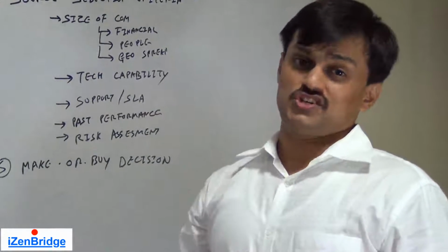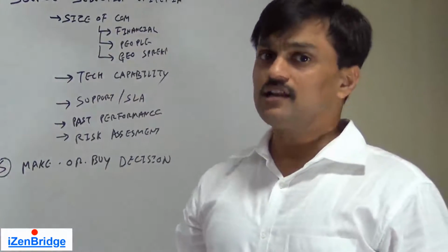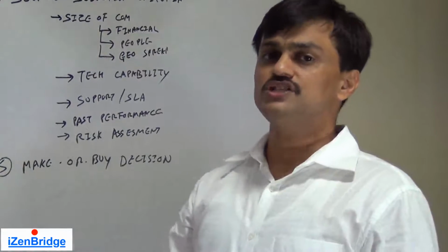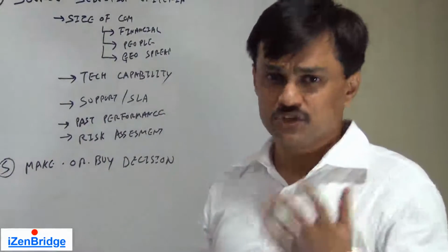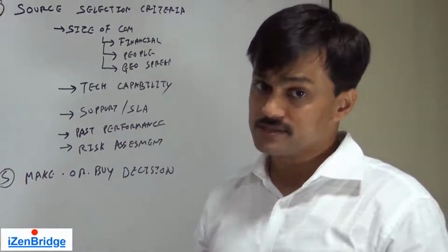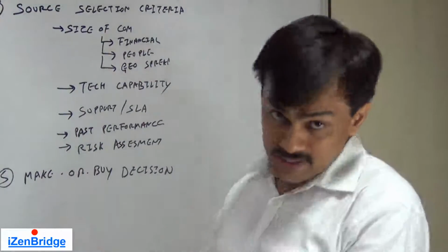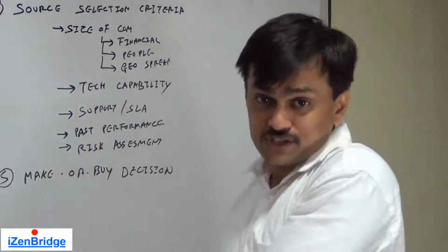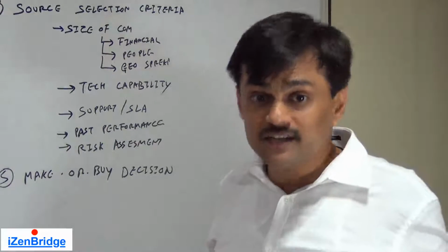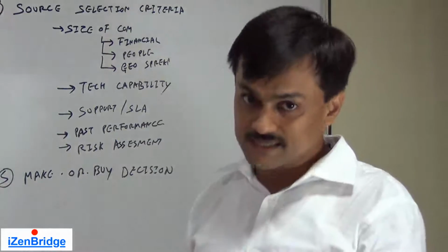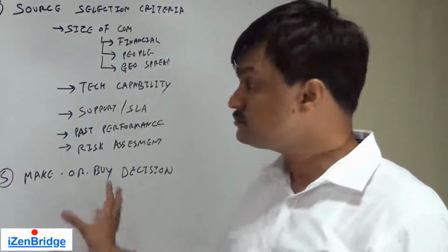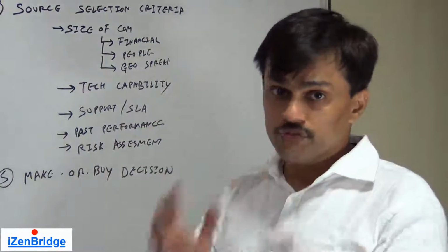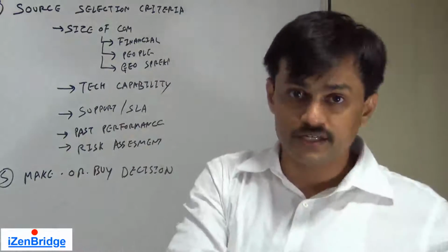Now there is a change. Till now we were getting change requests in monitoring and control, and sometimes in executing process group processes. This is the process in a planning process group which can result in change requests. Yes, because on the basis of the make or buy decision, we may recommend doing a few things outside.